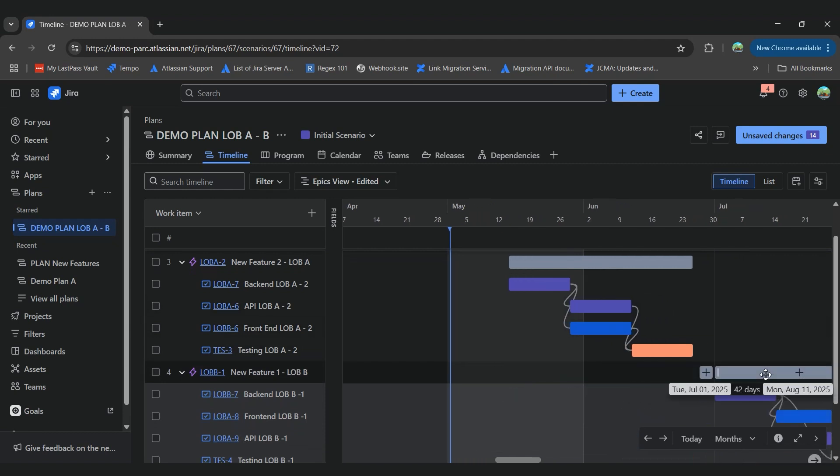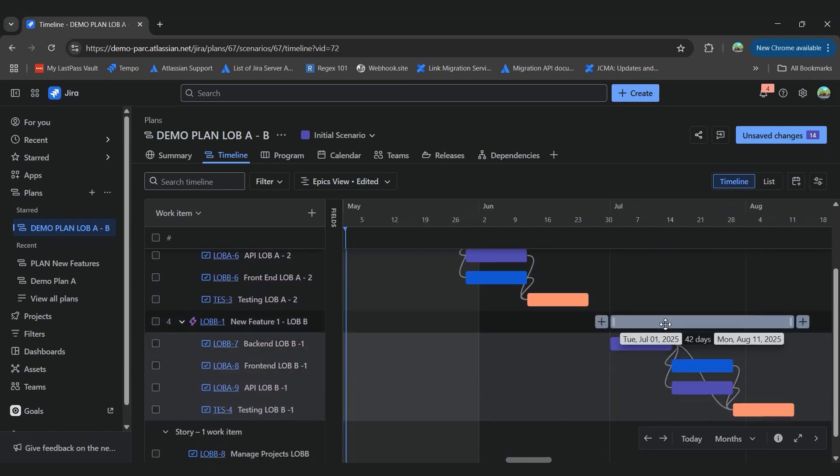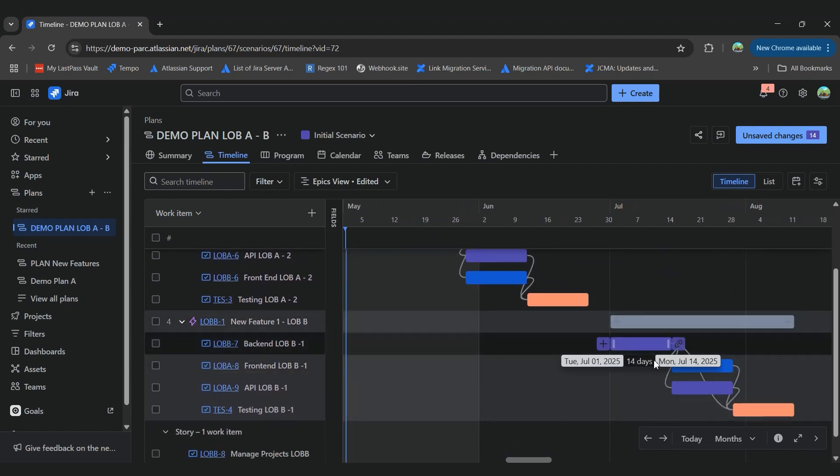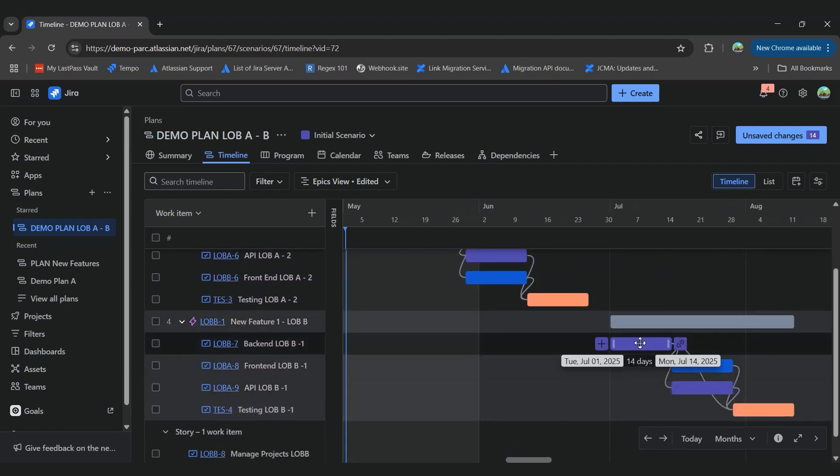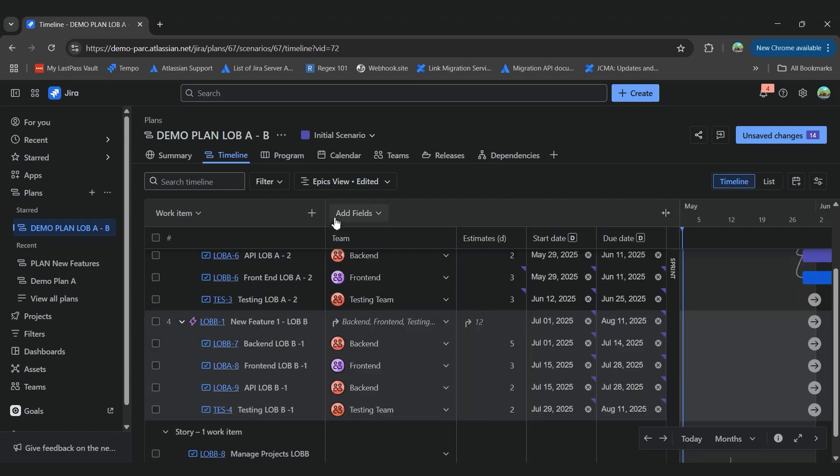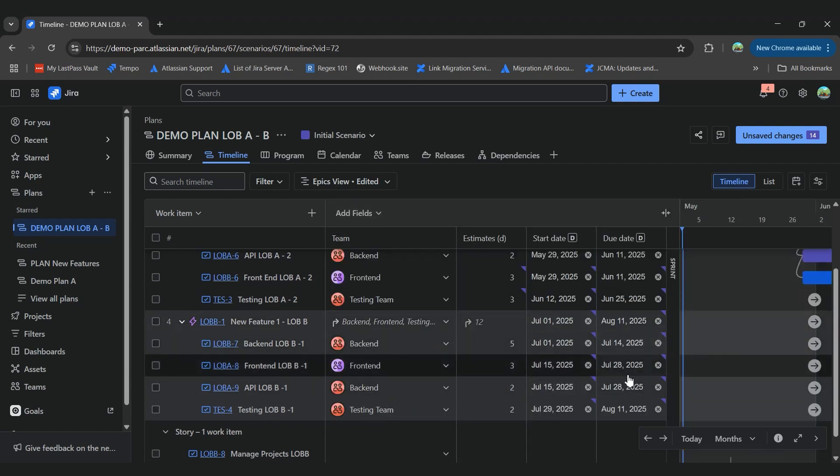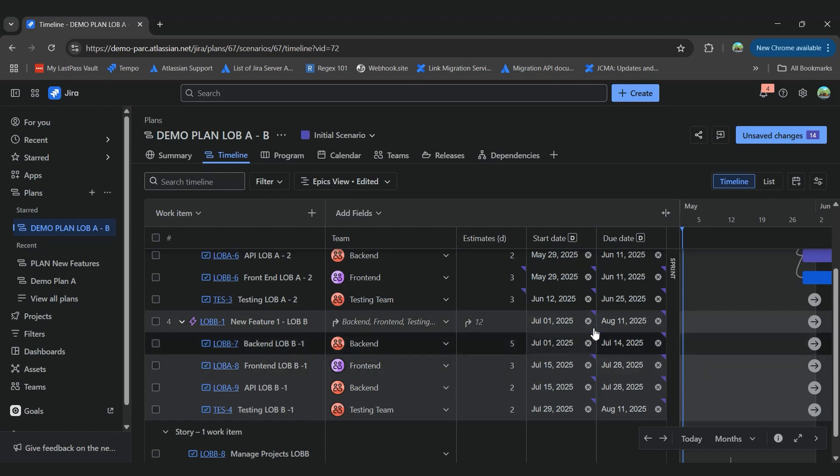It will move all the information of their stories, and it will move also their due dates and everything. So we can check that here. We'll see that it will start the 1st of July, and it will go until August 11.